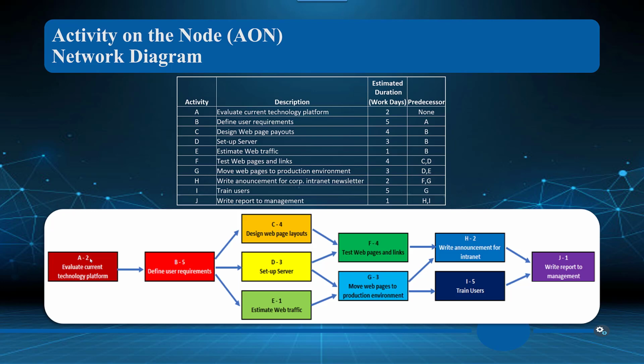Now, there is a much better technical way to do that, and we're going to get to that in a sub video, which is creating PERT charts. Okay. PERT charts have all the pertinent technical data, and again, we can create a PERT chart based on the overall work breakdown structure, and then we can do subcharts for each task with the subtasks so that we can see the critical path through the whole project as well as the critical path through the subtasks. Okay, and so we would associate that and create that graphical representation.